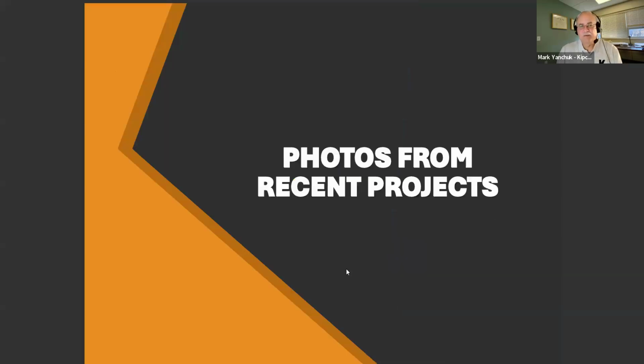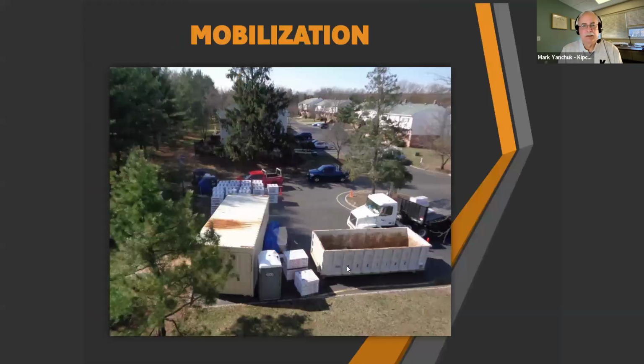I'm going to show some photos from recent projects. I'm going to go through these quickly. So there's staging area. On any of these projects, you're going to have staging area that you're going to need on site for containers, dumpsters, pallets, porta-john.